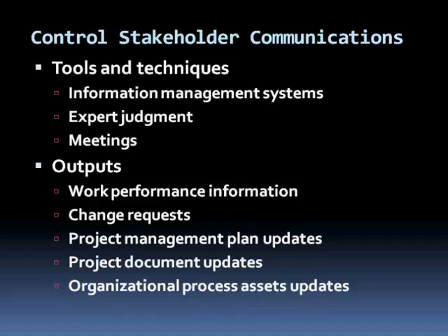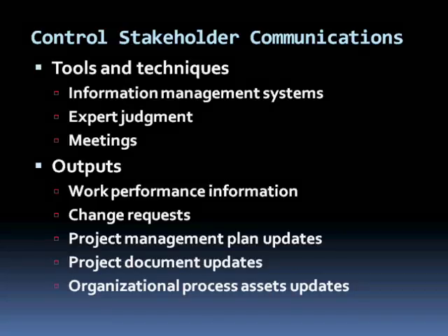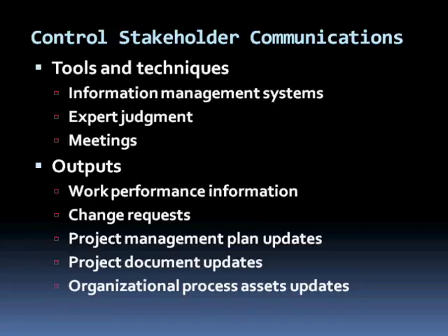And the results, the work performance data that you collected, you will process into work performance information, which will be meaningful information that could be shared with stakeholders. Then there could be change requests. If you find out that things are not going as planned, there could be change requests, and subsequently there will be updates to the project management plan, the project documents, and the organizational process assets as a result of those change requests.